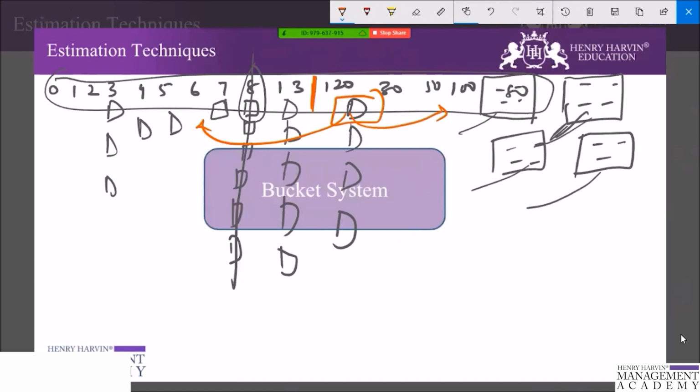It is not acceptable for an individual to completely abstain from the process. If someone desires to abstain, they should be counseled that this means they will not have any future say in the estimate. Also, during the divide and conquer stage, it is critical that absolute silence is maintained. In particular, there should be no bilateral discussion of the items. This is to protect the autonomy of the individual placing items as much as possible.